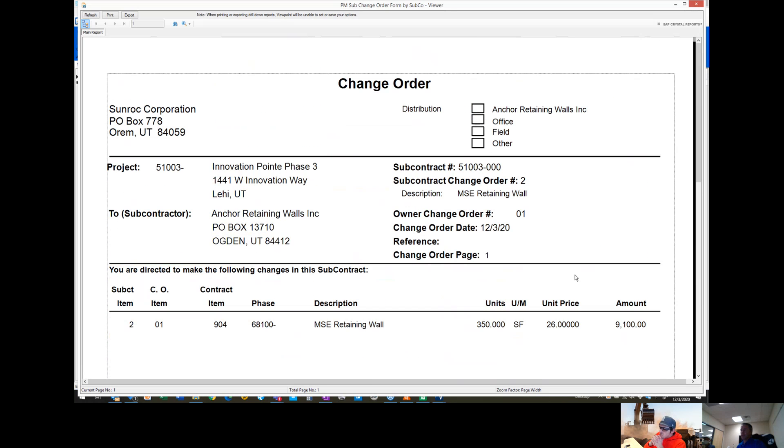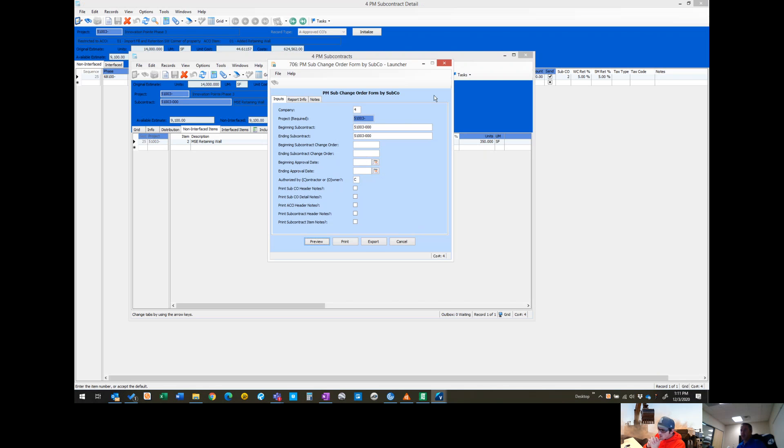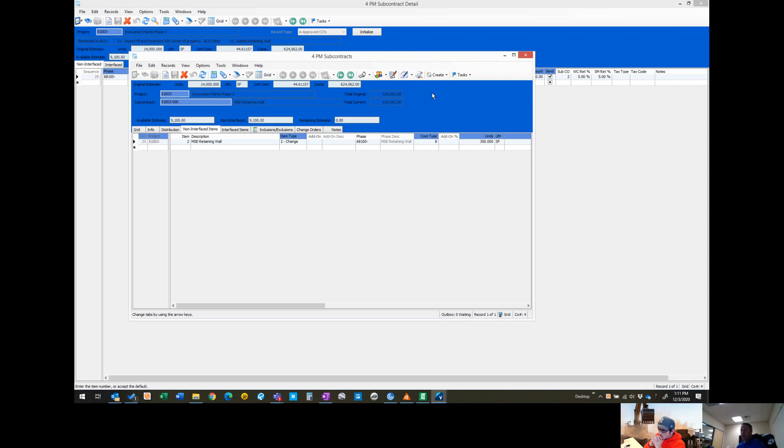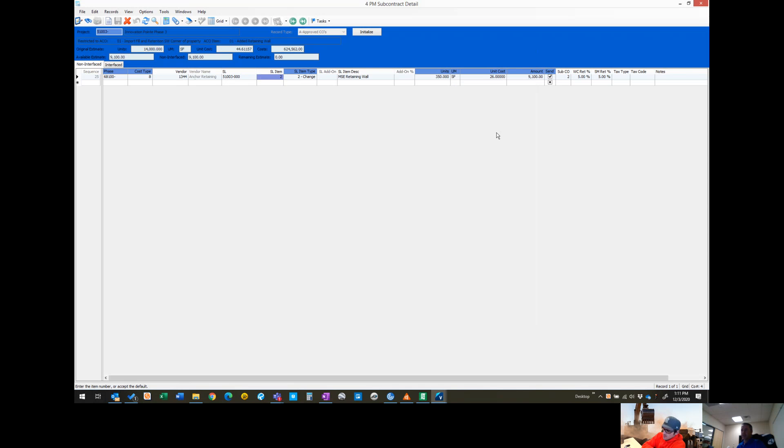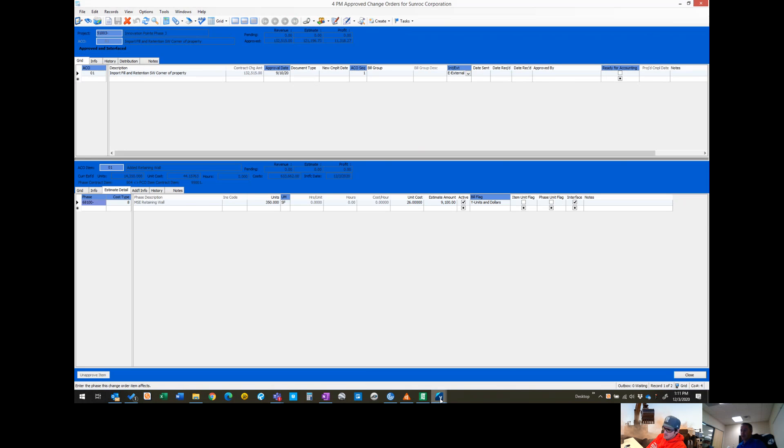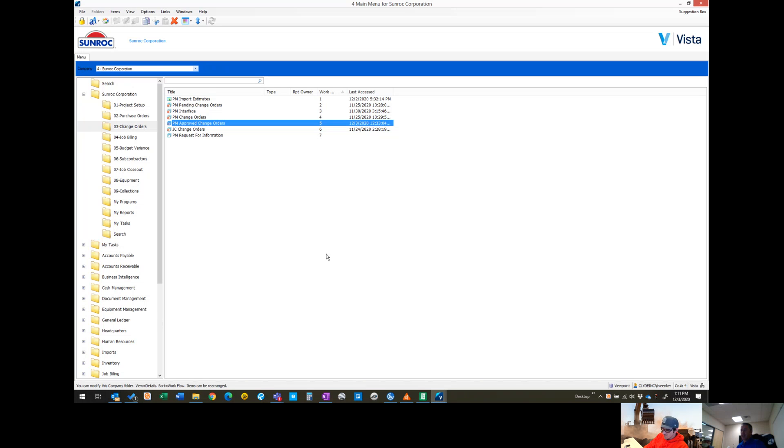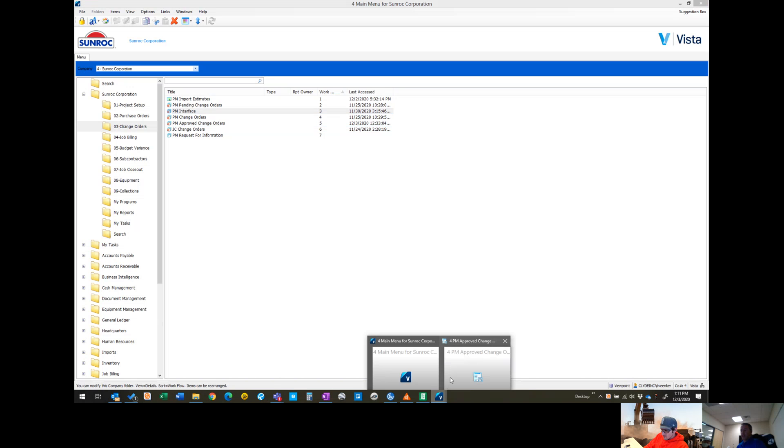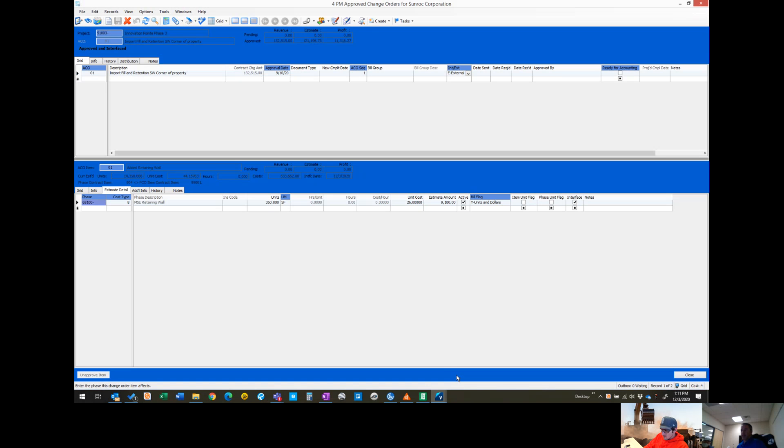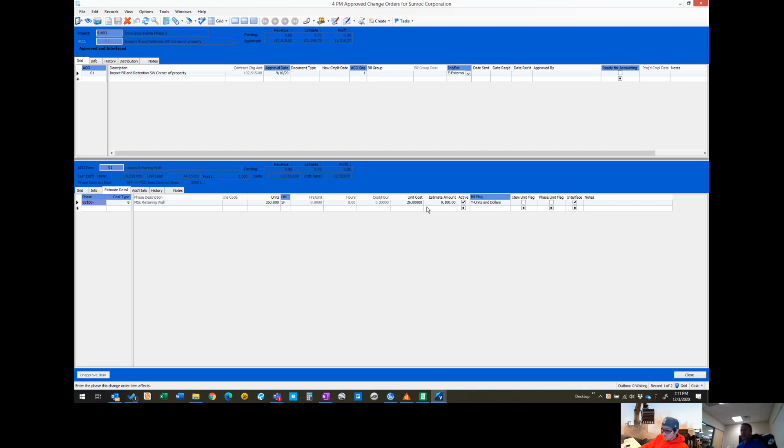Once you've printed this off and sent it off to them, kind of the last step is just to do a PM interface. Do you interface it before you send that to them? Can you still get back in there and pull up that? If you interface the change order and they come back and tell you there's errors, then I think it's more difficult to undo it. So you could wait to interface the change order until they signed it.